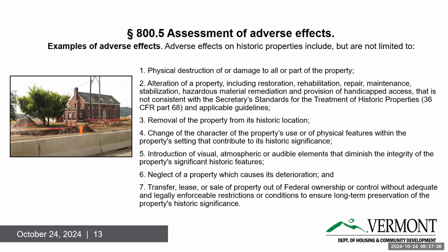Then we had to justify where it was going to be located and how it could still retain its integrity and be significant. We argued, I felt very strongly that it still would retain its integrity as a railroad station under criterion A, as well as architecture under criterion C. The National Register felt that because it was no longer associated with railroad tracks, that it was in a downtown, it no longer was eligible under criterion A, but it was still eligible under criterion C. So it's still listed on the National Register.